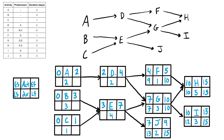For activity D, there are also two successors, so we bring the smaller late start: nine or seven — we bring seven in as the late finish of D, then subtract the duration to get a late start of five. For activity E, it also has two successors, so we grab the smaller of seven or thirteen — we bring seven in, and seven minus four is three. For activity A, it has one successor, so we bring the five straight across and five minus two is three. For B, we bring that three straight in and three minus three is zero. For C, we also bring the three straight in and three minus one is two.